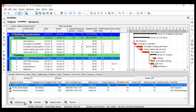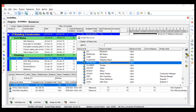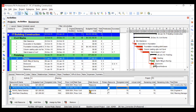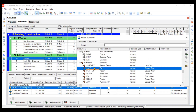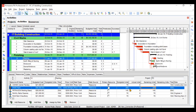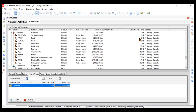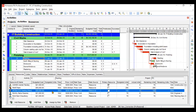For painting, we have two painting masons. We add the painting mason and since we need two, we change the budgeted units from 70 to 140, which doubles the cost from 14,000 to 28,000. One more resource required is the paint material. The budgeted unit for paint is 280 — because paint is 40 square meters per day as the default unit — multiplied by $200 per square meter.